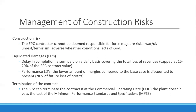The EPC contractor cannot be deemed responsible for force majeure risks such as war or natural disasters, as they cannot control those. There could be liquidated damages equivalent to the penalties accepted by the EPC contractor because of delays.